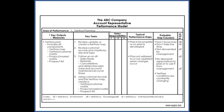Here's an example from the mid-80s that I've generalized a bit. We're looking at what are the key outputs for a chunk of the business, of the process. If we think of ADDIE — analysis, design, development, implementation, and evaluation — and look at one of those chunks, we'd want to know: what are the key outputs produced in that chunk? It's a work breakdown structure approach. We want to know what the outputs are and what are the key measures — simply, how do we know a good one from a bad one? We want to pin that down because that's the focus: begin with the end in mind.